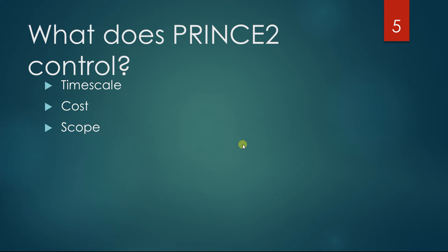And as the nice guy I was, I said of course I can do that. But I forgot to tell the customer that then the project will be finished some days later. So it's really important to remember that when you change one of these three variables, you will also change the other ones. But PRINCE2 adds some more variables, and they come here.